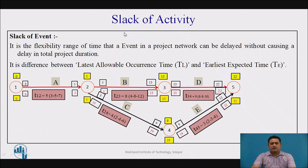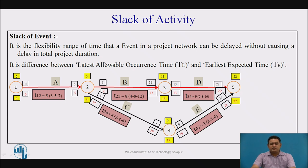This is the slack of an activity. As seen in CPM there is a float; in PERT there is a slack. Slack is the flexible range of time that an event in a project network can be delayed without affecting the overall project duration. The slack value is obtained by the difference between the latest allowable occurrence time and the earliest expected time.